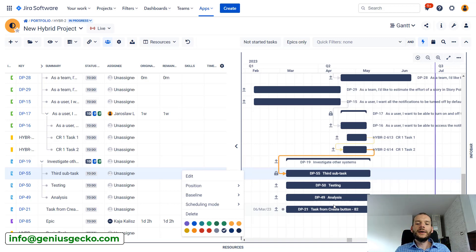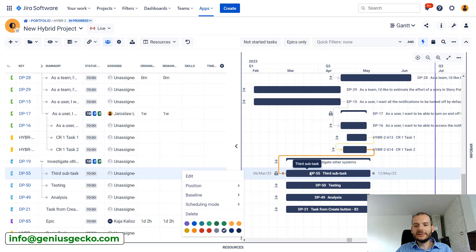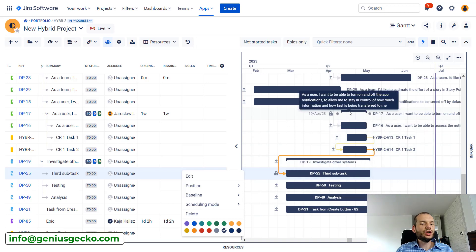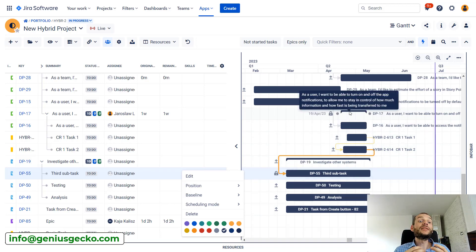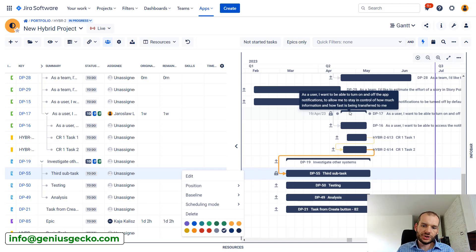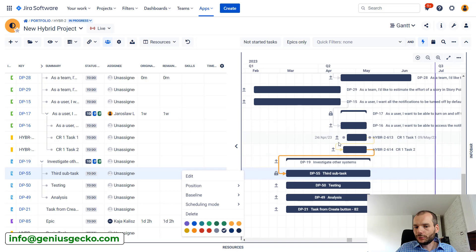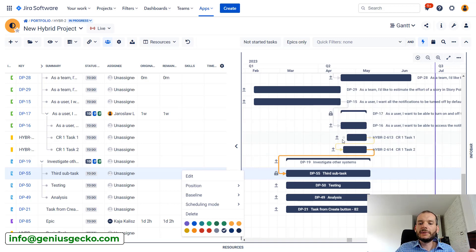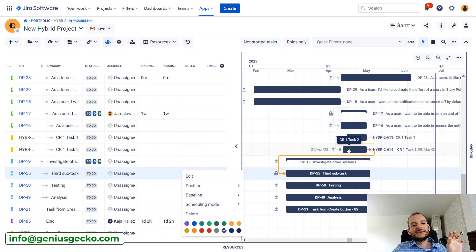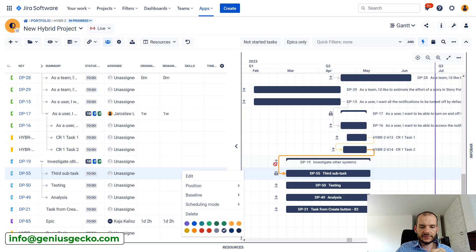And now we have all the new work identified and dependencies created. Our plan was not updated in the meaning that these existing issues were not moved. And from JIRA's perspective nothing new was created. We created no new JIRA issues and these dependencies that we see over here are also stored only within Big Picture because they exist not between JIRA tasks but between JIRA tasks and basic tasks.